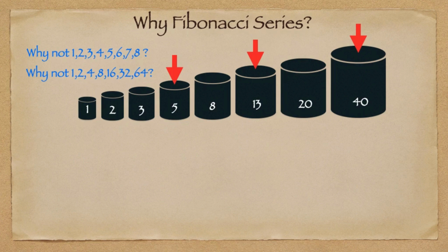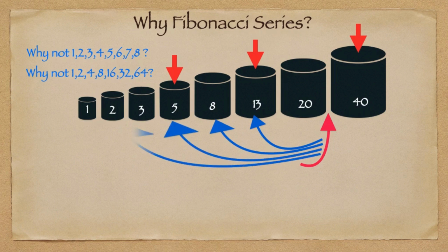That is the first advantage. The second reason is, for example, our reference is 5 and 13. The team is estimating a new item which they realized it is definitely bigger than 20, but 40 will become too much. So obviously there is no number which is matching. So they can't go either with 20 because they realized bigger than 20. So obviously they will break that item into smaller items and they try to identify the suitable individual smaller buckets. So that means the complexity of the large items can be broken continuously to make them into definite size estimates.